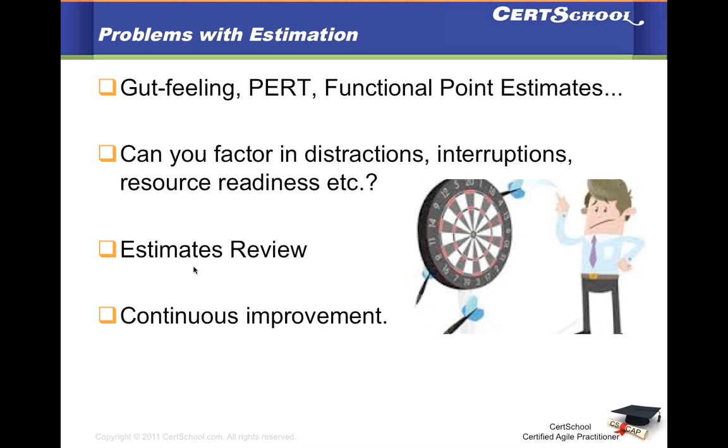And then continuous improvement, like, do we match what we estimated versus how much time it actually took, and why it took extra time or lesser time than what we had, why there was a discrepancy, and how much was the discrepancy. Once we are able to objectively analyze that, we have to find a way to improve our estimates next time, not make the same mistake again. Okay, so we don't really do this continuous improvement in the estimation itself.